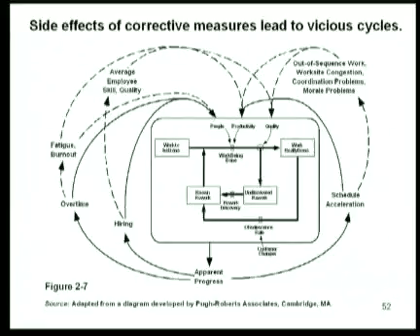There were schedule alterations because of work being out of sequence and so on, so that negatively impacted the quality and the productivity. The people were negatively impacted because of the burnout, and well, anyway, it became a very real problem. All these externalities, well, they were externalities initially. People hadn't thought about them.